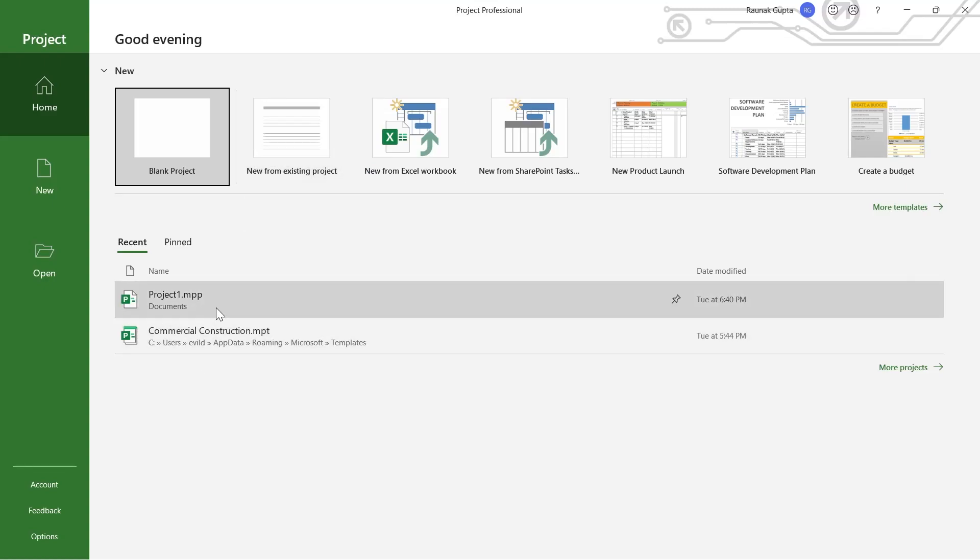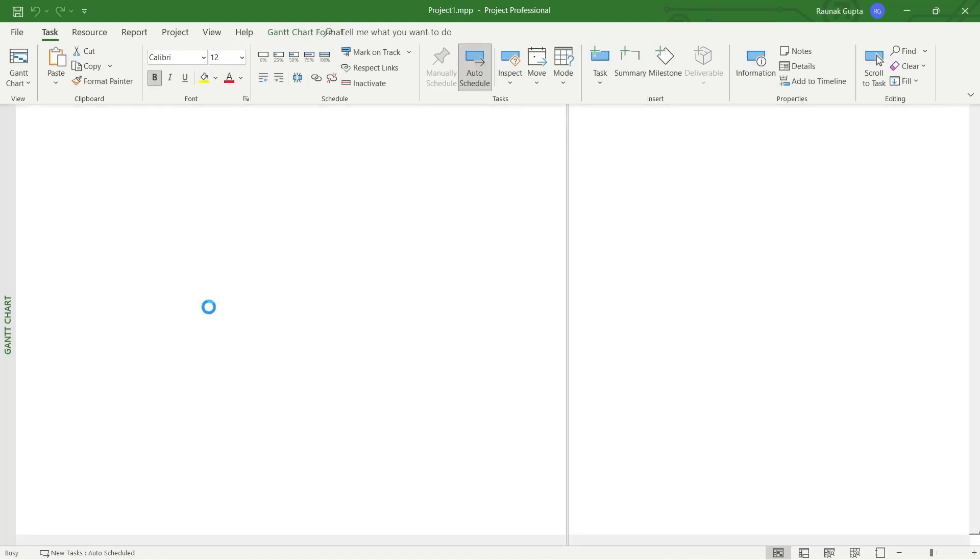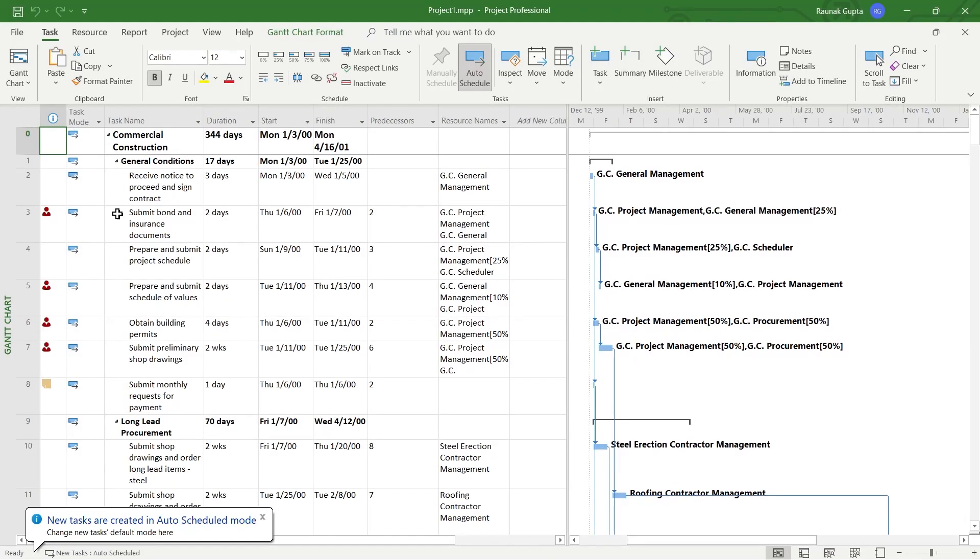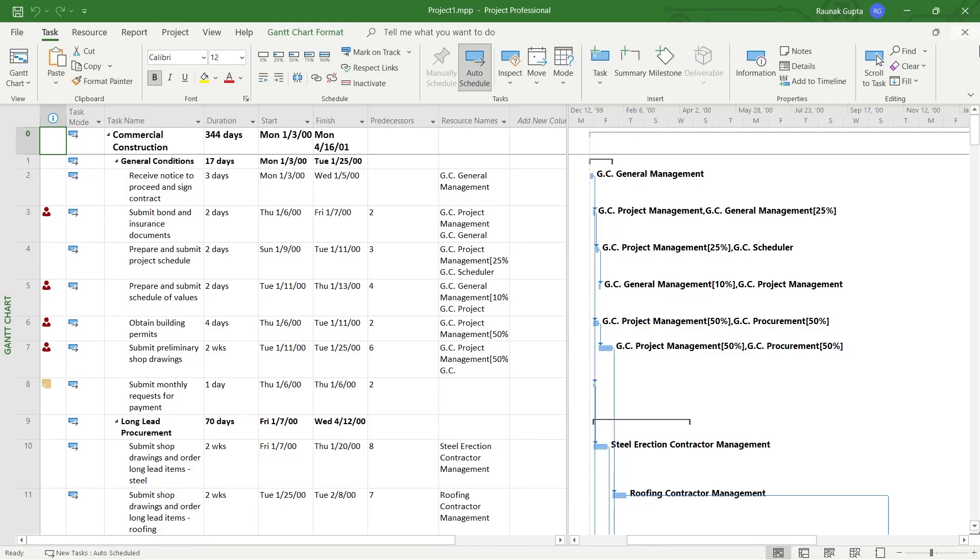So here, open your project that you've been working on and here you'll have your tasks, your Gantt chart and the toolbar at the top. So if you want to set a baseline, first of all, select the task that you want to set the baseline to.